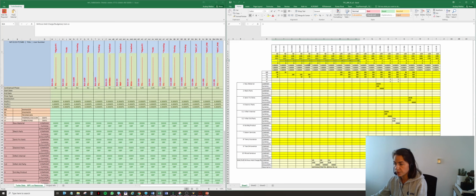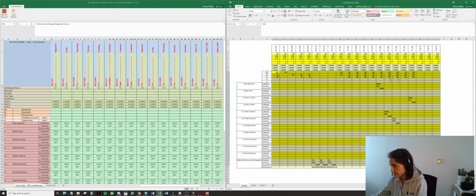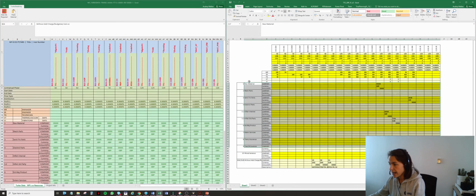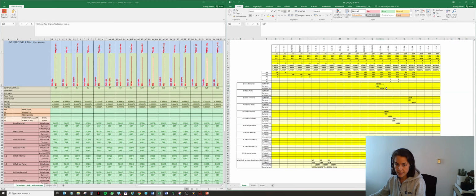Then you have here information on the price types, the distribution profile, and all of this costs information. So here we can find again the hours, the days for the facilities, and down below, all of the other direct costs will have one line related to the company associated, the currency, and the amount. So if you have all of this information, you can fill it in the proper box related to the work package versus the cost item.